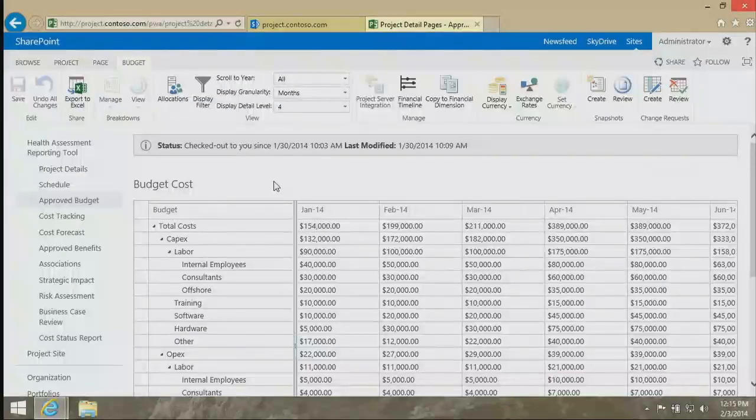Simply open the report, let's say the 8th day of the business month, reporting on the previous month, and pull in the information from the financial system. As a project manager or person responsible for doing that status report, I would then come in, capture my accruals if needed, right? Because maybe you knew more money was spent, and then submit that report, having updated my forecast.